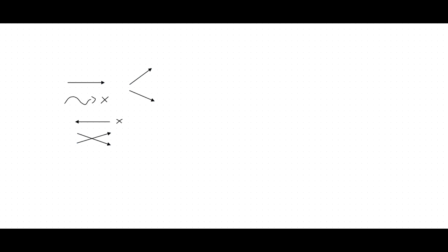And also, when I'm going to draw the arrows, remember, cross arrows are also not allowed. Cross arrows not allowed. And the length of the arrow, whether you draw a small one or the biggest one, is no problem. It's up to you. That's one of the most important rules you should remember when you draw the network diagram.